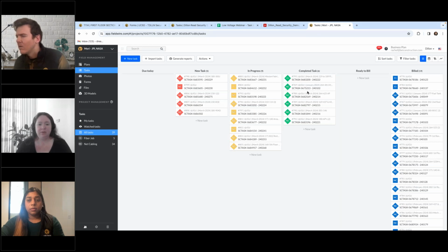our team on site receives a service request, and the foreman creates a new task that is associated with it so we can track each one individually, because each one is going to be billed and tracked on a time and material basis. So we have to make sure that we have a log for every single individual task.